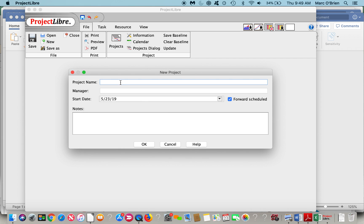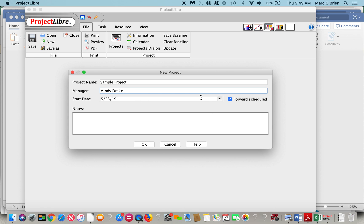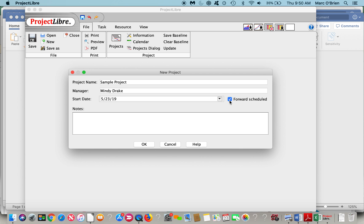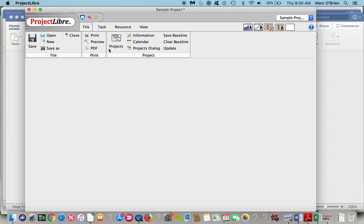I'm going to create a project. I'll call it a sample project, and I'll give it a Project Manager's name, Mindy Drake. I can give it a start date. However, if you deselect forward schedule, you see that changes to finish date. So if I had to finish by the 4th of July, I could put that date in, and it would backward schedule and tell me when I need to start that project. I can give it a note.